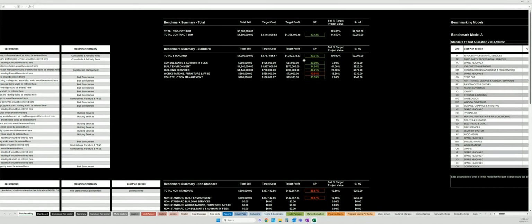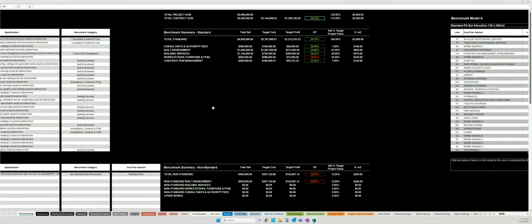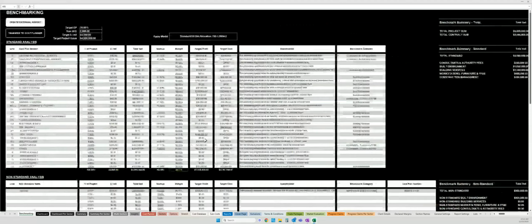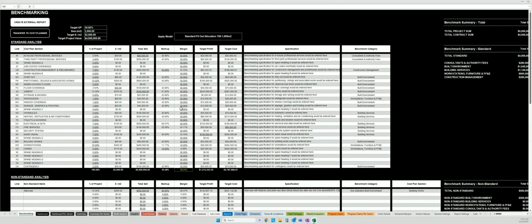This is the pathway. This is the profit plan in order to hit our margin based on a number of assumptions, including non-standard items. And so we can now see this would be the typical spend. This would be our target cost. If this project was to proceed as is, this would be the target cost per package. So it gives the team a target to start with.